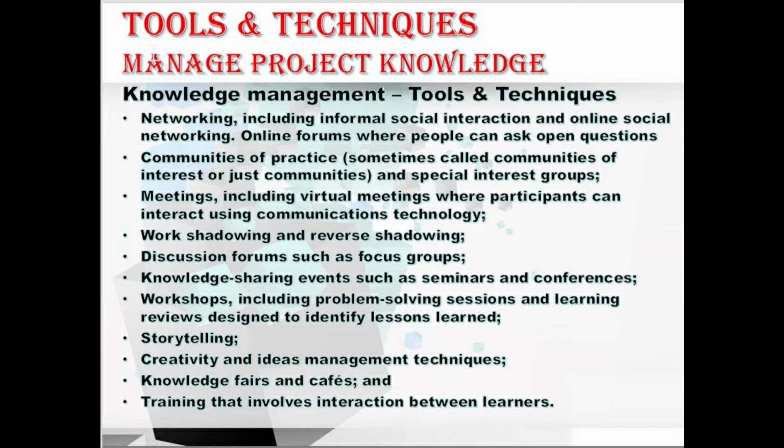That is, we have the networking, which includes informal social interaction and online social networking, the online forums where the people can ask open questions, and we have meetings, which includes the virtual meetings where participants can interact using the communication technology, and we have work shadowing and reverse shadowing, and we have discussion forums such as focus groups, and we have the knowledge sharing events such as seminars and conferences, and we have the workshops including the problem solving sessions and learning reviews designed to identify the lessons learned,